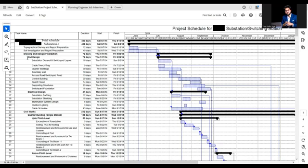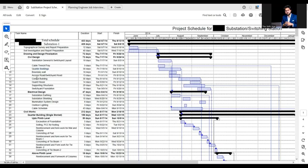We have to define our civil design, then we have electrical design. In civil design, you can have substation general switch yard layout, cable trench, tray design, quarter building, boundary wall, access road, control building, and guard house. All these products need engineering deliverables — engineering documents, construction drawings, or whatever. We have divided this design phase into two categories. The second is electrical design, which includes substation earthing, substation shielding, and illumination system design. All these design documents belong to the electrical design discipline.